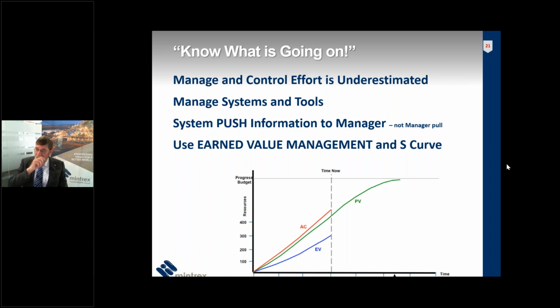So the earned value management system is very simple. You start off with a project budget that has a timeline, a deliverables timeline, and milestones in that timeline that can be measured. And then you have the actual costs of performing the work as you go along, and a good accrual accounting system is going to do that.